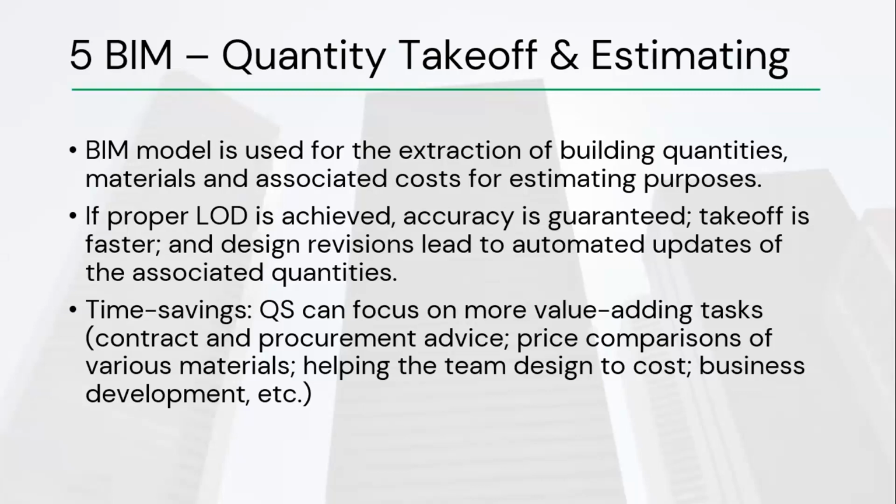And that's why it's important for the quantity surveyor to understand how this model is developed, how a 3D model is developed, and to have a basic understanding of how the construction schedule is linked to this model. Also, skills on how to manipulate this model, maybe to extract quantities from it. Maybe you want to extract window and door schedules, wall schedules, surface finishes schedules, and all that to help you in cost estimating. So the model authors need to search for the level of development required to support cost estimation for this to be possible.